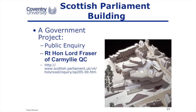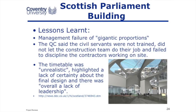Here are some famous project reviews — you could go and Google these. Do you remember the Scottish Parliament building? It was scheduled to cost up to £40 million and it cost £431 million. Because it was a government project, there was a public inquiry. The findings said that the lessons learnt were there were management failures of gigantic proportions. People weren't trained, people didn't do their job, there was no discipline on the construction site. And interestingly, the timescale was unrealistic — think about our triangle of project management — and there was a lack of certainty about what was required. So they didn't know what they were doing and they didn't have enough time to do it in, which is unsurprising that the cost went out of control.